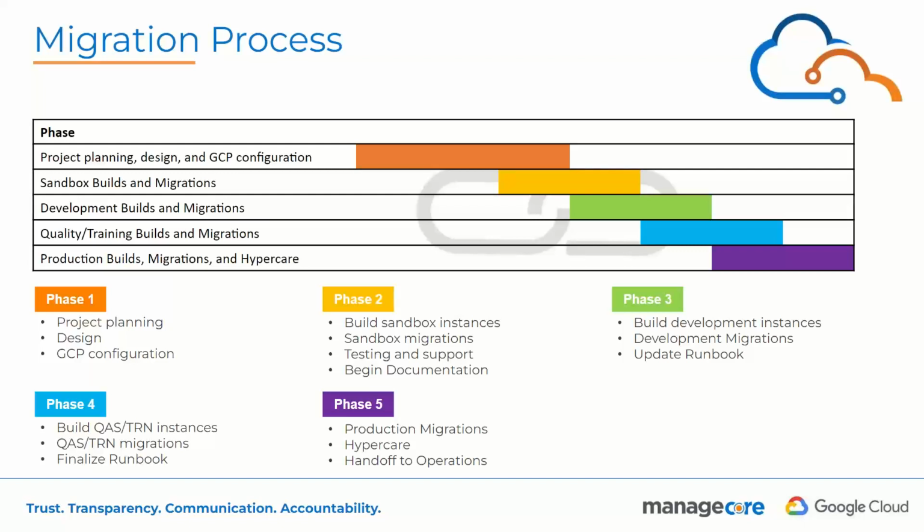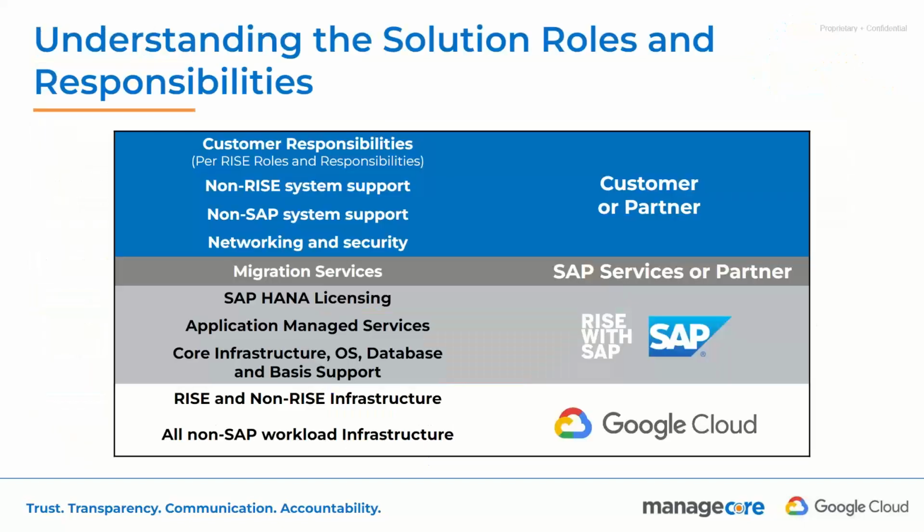We've also got a detailed project plan and cutover plan, which is detailed in many cases down to the minute. That helps our consulting teams to know where they are in the migration process. But more so, it helps us to be transparent with our customer and give them full assurance. Here's where we are in the process. Here are any of the roadblocks that we're encountering. And here's when we anticipate the migration will complete. So that's a little bit around the migration.